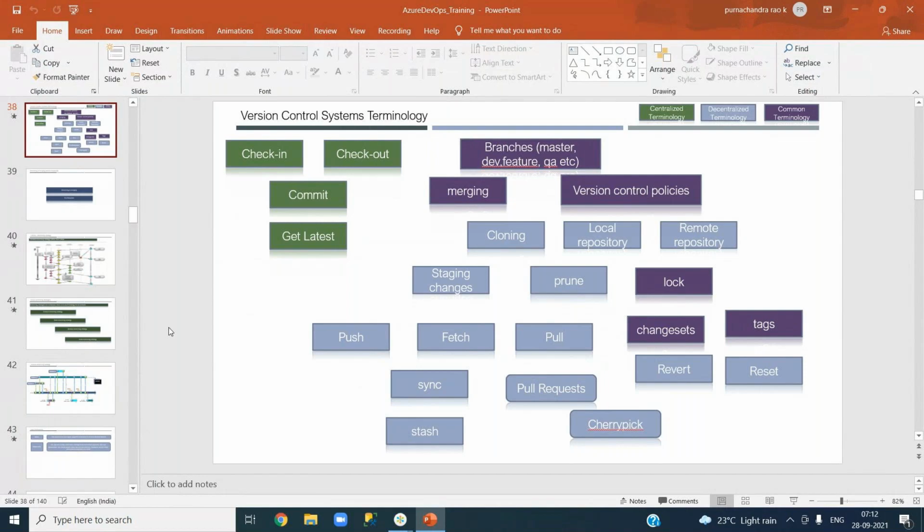Sprint 1, sprint 2, sprint 3 will be one release. Sprint 4, sprint 5, sprint 6 will be the second release. That means each release contains 3 sprints of work. So it depends on the project manager and the team and the type of the project they're working on. You don't need to worry about it.